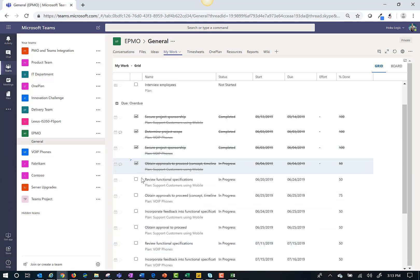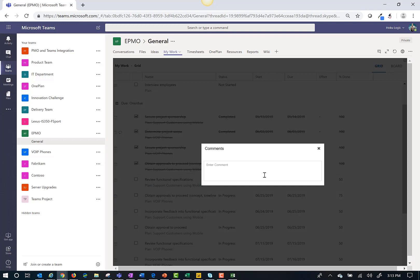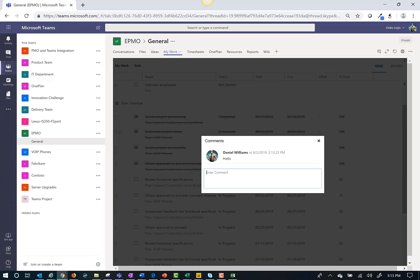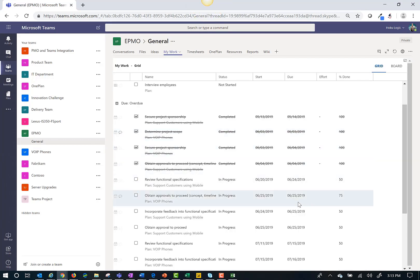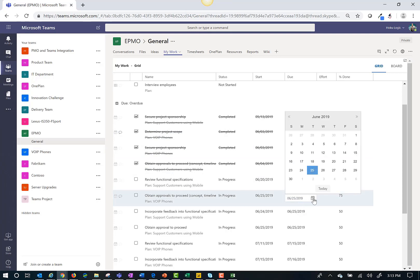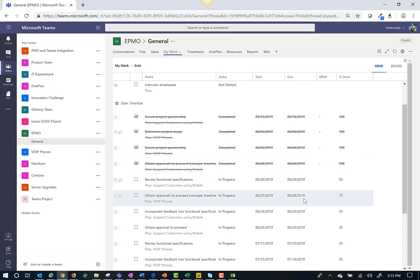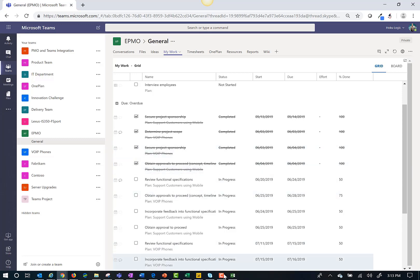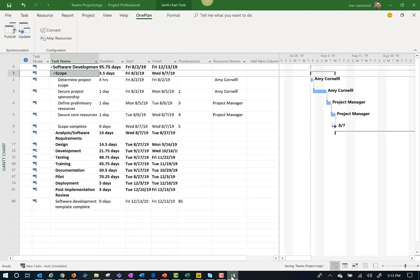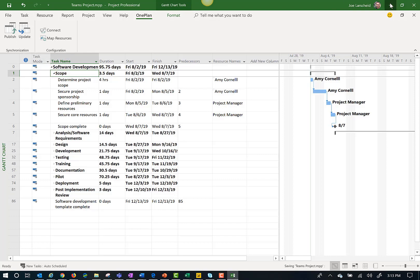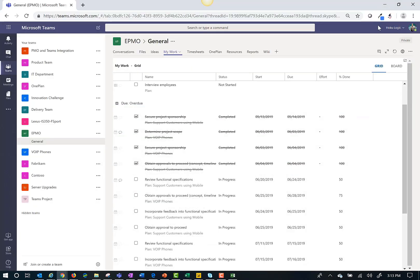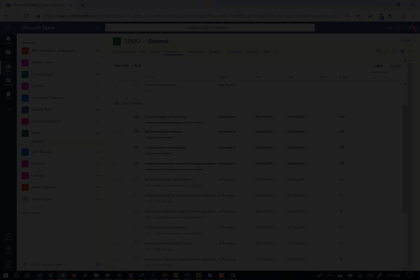Team members can make updates. They can comment to their management and they can collaborate. This is where a team member can make a change to an item or mark an item as complete. Any updates are then sent back to the Microsoft project file. As the project manager, I can review the updates directly in my schedule. Thanks for watching.